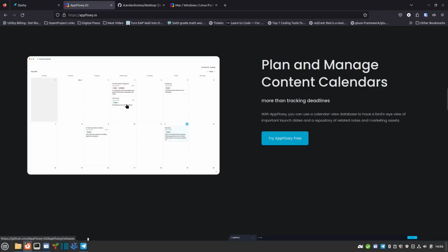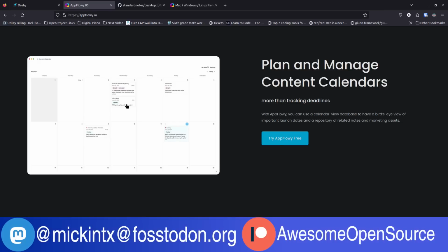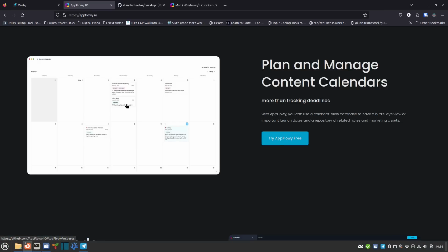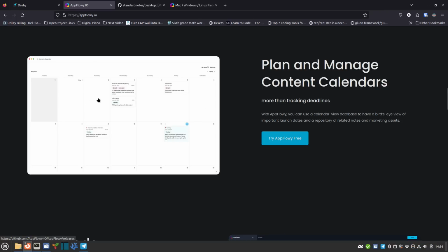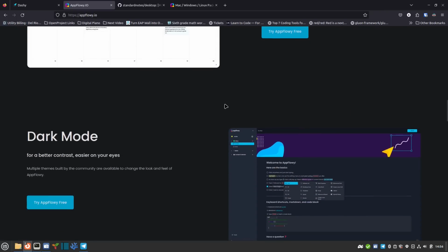So the calendar view is really important when you're doing project management to know when things are coming, what things you're expecting to get done, when you're expecting to get them done. For me as a product manager, I love to plan out my releases, and I try to put those on certain days on the calendar. We like to avoid weekends because we don't have a lot of support coverage on the weekends, and we don't want to release near the weekend so that we have a lot of calls coming in if anything happens. We prefer to release earlier in the week. So I can look at that calendar, see where those things should fall, and try to plan them out a bit ahead of time. So a calendar view is really great for any kind of project management.